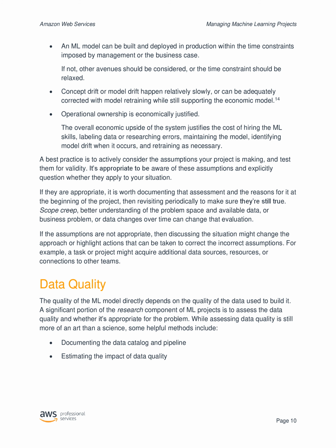A best practice is to actively consider the assumptions your project is making, and test them for validity. It's appropriate to be aware of these assumptions and explicitly question whether they apply to your situation. If they are appropriate, it is worth documenting that assessment and the reasons for it at the beginning of the project, then revisiting periodically to make sure they're still true.